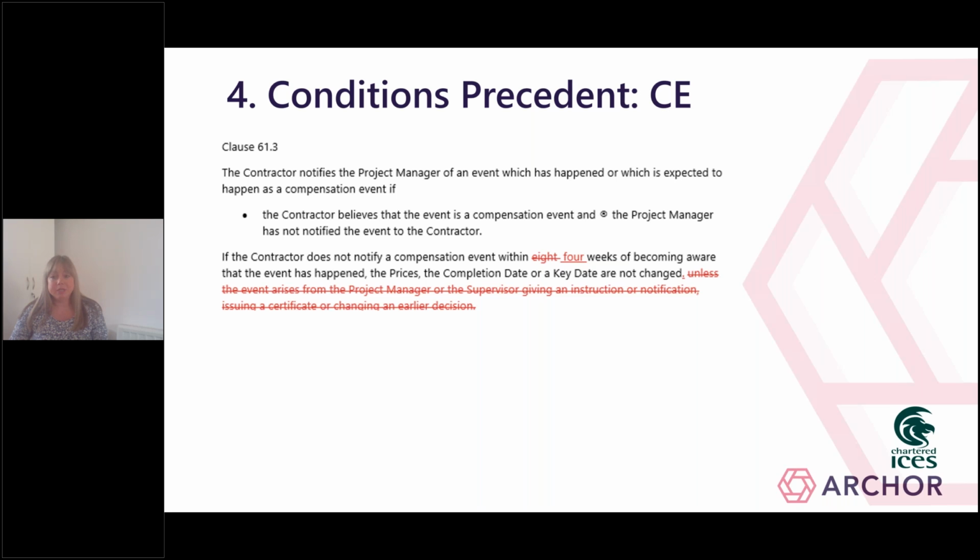If only certain specified obligations under the contract are expressed to be subject to a condition precedent, then the other obligations under the contract will remain in effect, but the relevant obligations only take effect when a condition is fulfilled. So if person A does not fulfill the condition, for example, to give notice within the requisite time period, then person B is not bound by the obligation on his part, for example, to allow a change to the prices